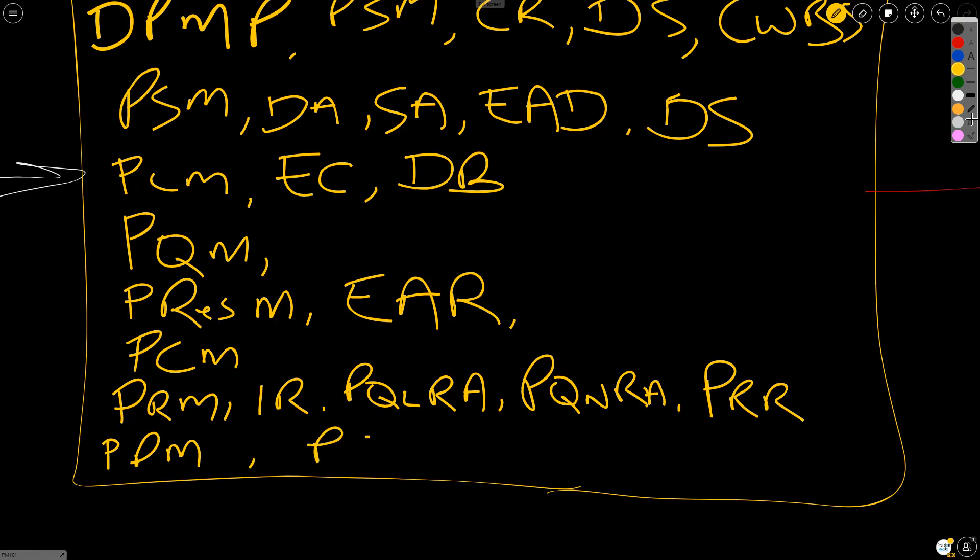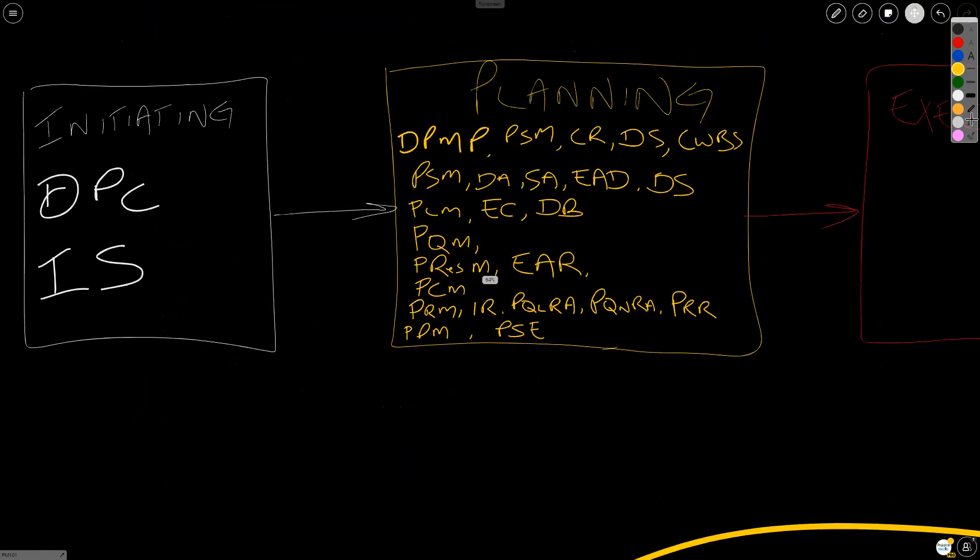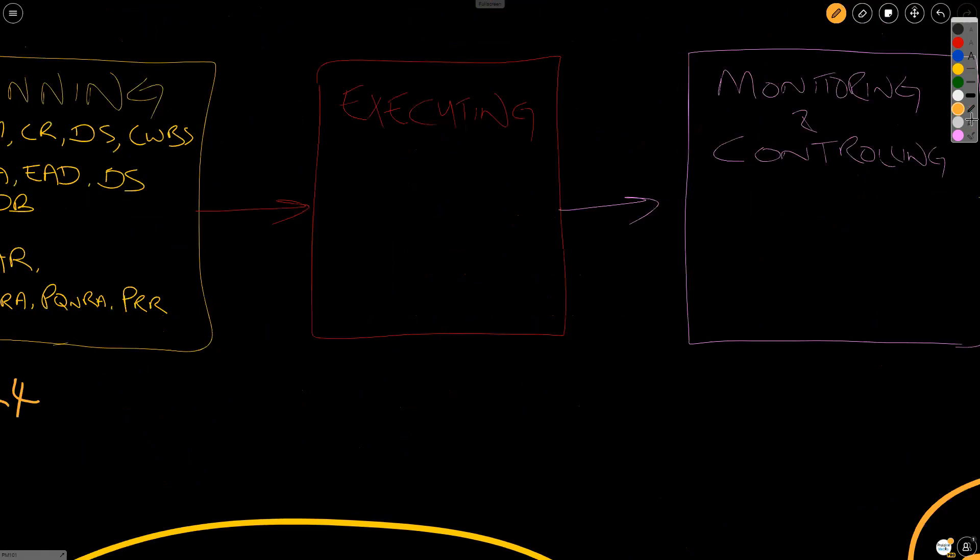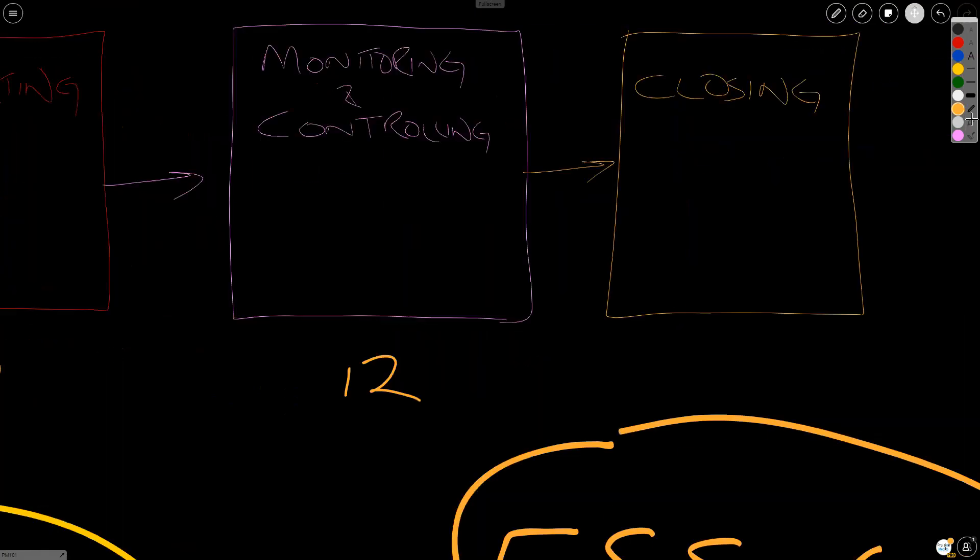So if you look out and you count, you can see we should have two processes in initiating, 24 in planning. And then in executing, we'll have 10. In monitoring and controlling, we'll have 12. And in closing, we'll have one. That one is easy to remember in closing. It's an integration.